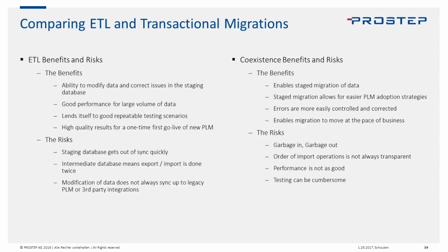Risks are, if you keep this around, the staging database can get out of sync. And that might be that people are adding new data into the source and you need to add that data there. Or if you have an update migration, something that gets deleted. It's complicated to keep that in line, and it's not tuned well for repeatable transactions typically.